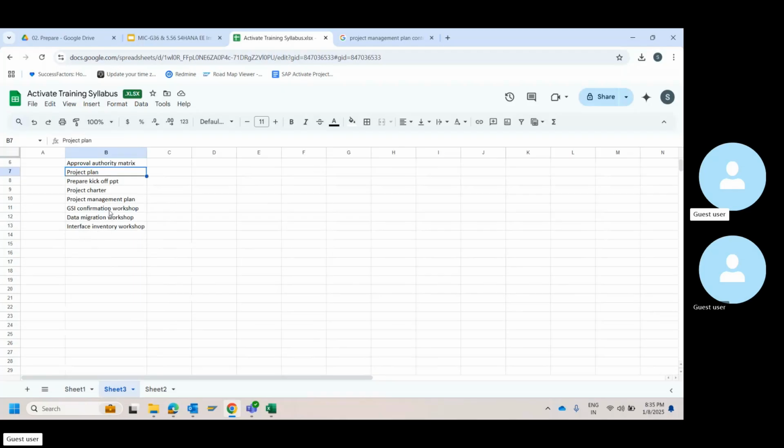All these 3 workshops will be run by your consultants, and they will produce the documents for all these 3. For this, they produce the report that I showed you yesterday, which you will consolidate. They'll download the templates, share it over an email, prepare an MOM and request an acknowledgement from the business process owners. This will become your deliverable.